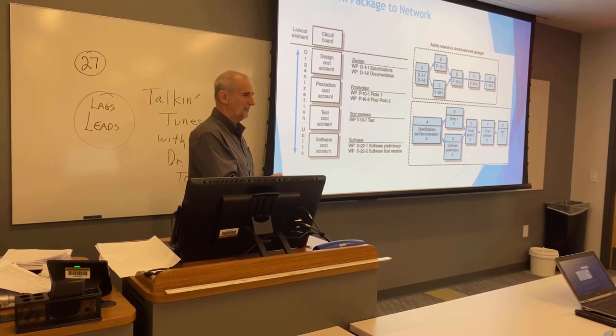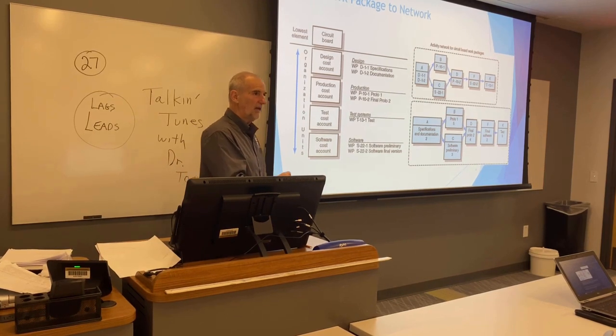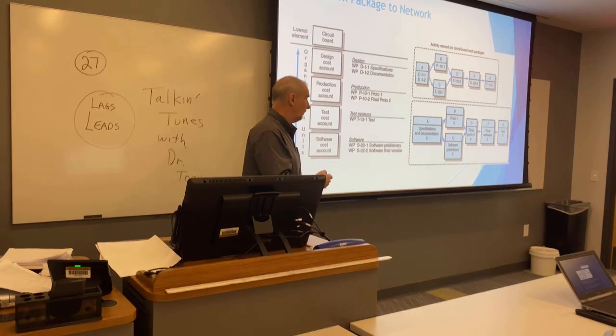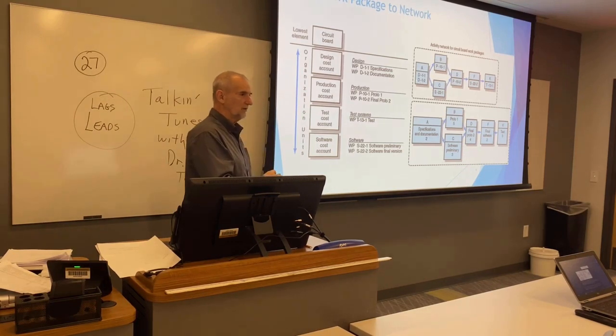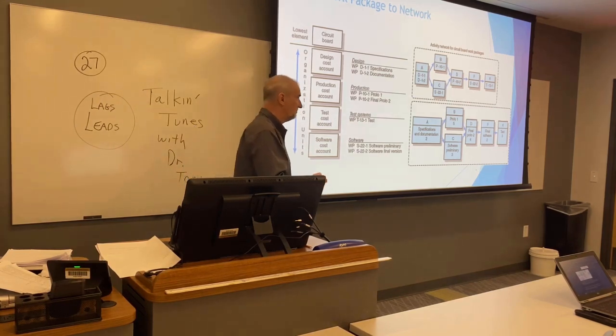It's not a trick question. This started on Monday, it takes 1 day. When can this start? Tuesday, yeah. If this takes 2 days, when's it going to finish? Thursday. It's going to start on Tuesday morning. When's it going to be done? Wednesday night, yeah. Okay, good.